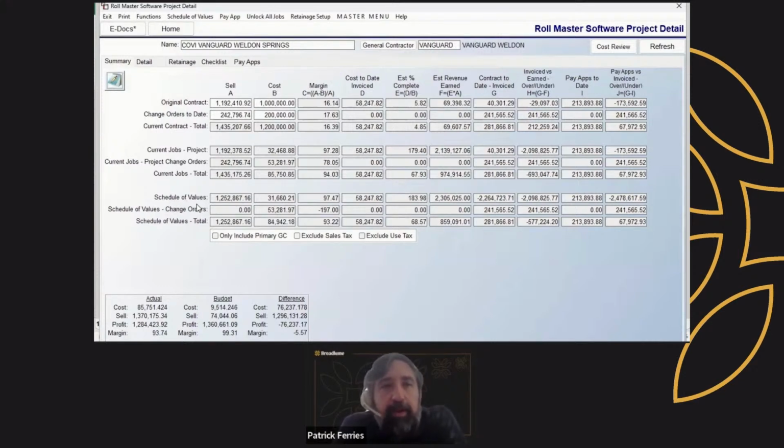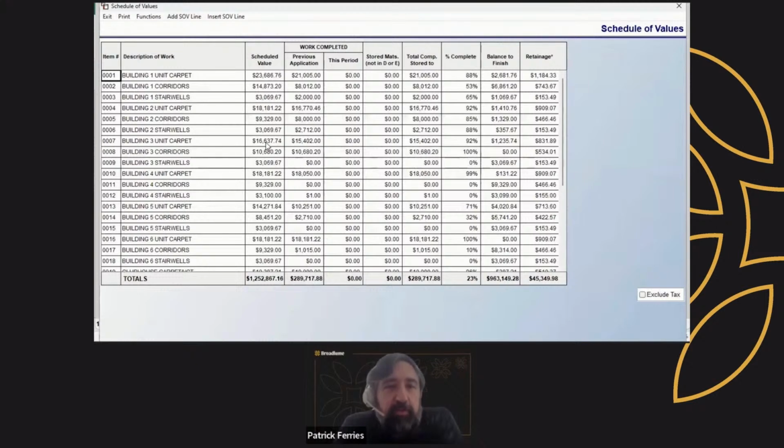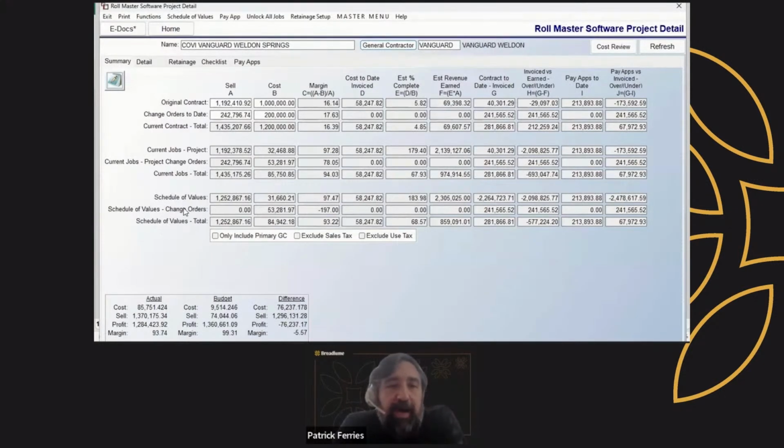We wrote a way in here where you can do a version of the schedule of values within the system. And I don't really train clients to use this that much, because what I found in the real world is that you have to use the format your GC makes you use. So you're usually going to do the schedule of values in Excel based on the requirements of the GC. If you want to keep up with it here, more power to you. That's up to you. But most people I meet are just doing the schedule of values in Excel because they have various formats they have to use for the GC anyways, and they don't want to keep up with it in a separate place. So we won't talk much about the bottom layer schedule of values.